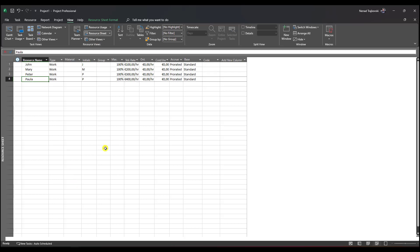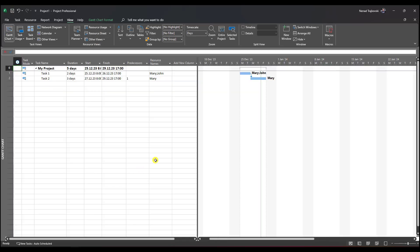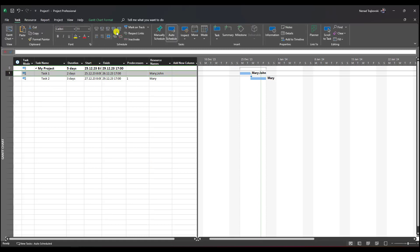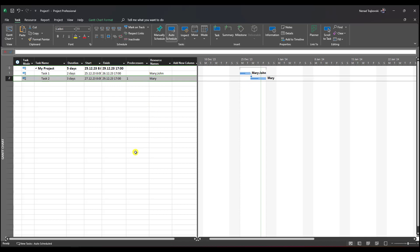Now I'll make task one 50% done and task two 50% done as well. I know it doesn't make sense to have task two at 50% completion when task one isn't finished, given the finish-to-start dependency. This is just an example and only for the purpose of showing you how to replace multiple resources.